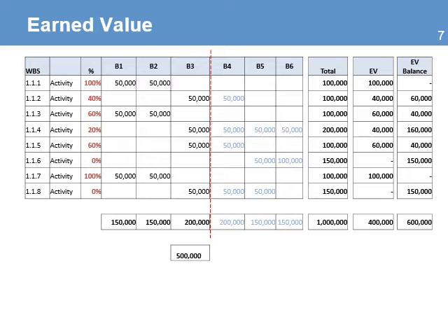When you calculate the value, you see that the total earned value at month 6 is $400,000. And when you compare it to what was planned value for the same period, $500,000, you can see a difference of about $100,000. The project delivered less value than planned and has an EV balance to deliver of $600,000, which is more than the balance of funds.